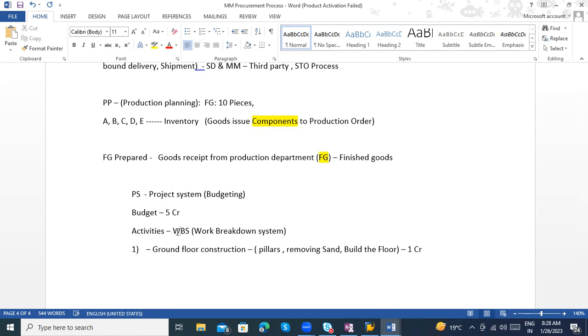When I'm allotting a resource, I consider how much we are paying, what my margin is, how much profit we are getting, and what the target budget is for the project. If it is a 50 lakhs project and I assign 20 resources costing around 2 crores, then it's a loss, right? So there should be a limited budget allocation, because we are also looking at the margin, and I have to check how much amount you spend on the project.